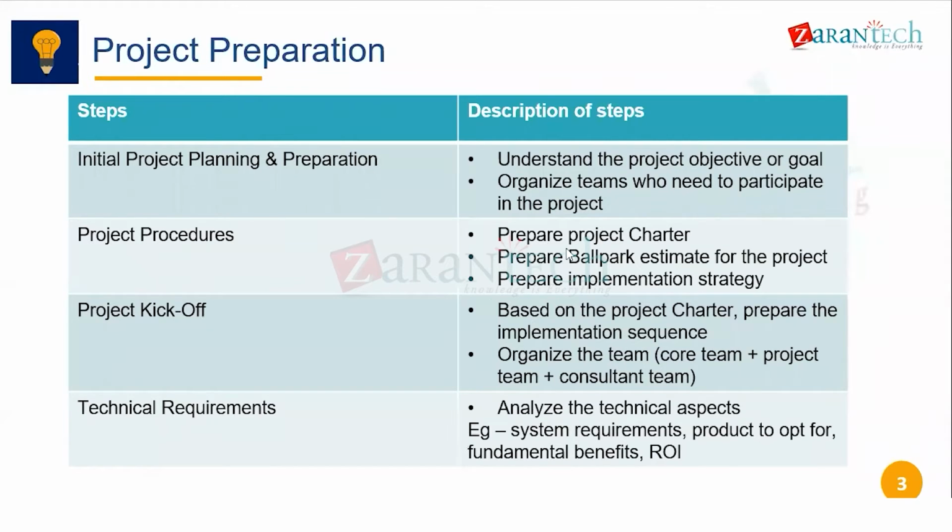Then comes your project charter. This is the first document that you create for any project. So what does this project charter mean? The project charter tells you about the basic purpose of this project, how many consultants need to work, or how many business persons need to devote their time for this project, and the ballpark estimated cost, or the running cost, for this project. At this time only we come across a ballpark estimate for this project.